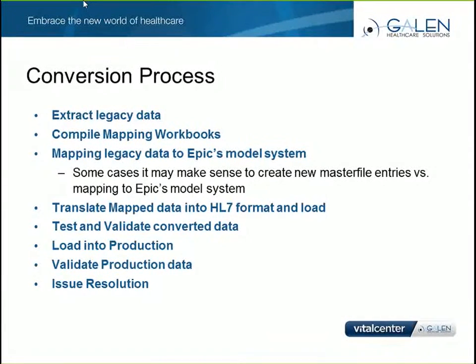It is recommended that you load a couple of charts and then have your clinicians be present to verify and validate the data is coming in correctly. Once you're comfortable with what you're seeing, allow the conversion to move forward. You'll probably encounter errors. The error resolution will depend on what the error is and when the error was detected. Your project team can work with Epic and your providers to determine the safest way to resolve the error.